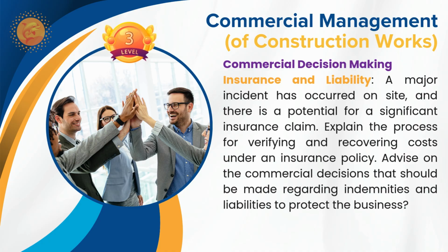Like we have professional indemnity insurance. If at all we are designing something structural or some special elements that require detailed design other than the employer's design, or if we have some design development responsibility, then we would have this PII cover. That is most probably at the design responsibility level.